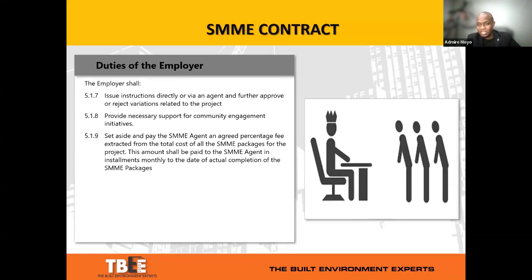And because this is not a standard contract, but it's a sui generis contract. It's a unique contract, but it operates like any other contract that's out there that's standard. You can alter a clause, you can amend it, and so on, as long as you're not altering the essence or the essential ingredients of the contract itself.